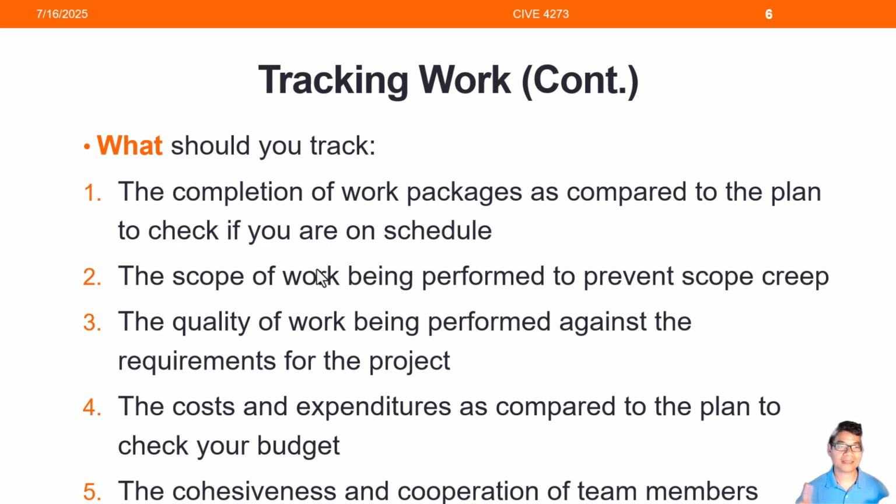As we talked about early in the semester, we talked about the interrelationships between scope, budget, and schedule, those three basic components. If you increase the scope, very likely you're going to have impact on your budget and schedule. So it's always important to monitor the scope of your work. Make sure you don't end up increasing the scope of your work.